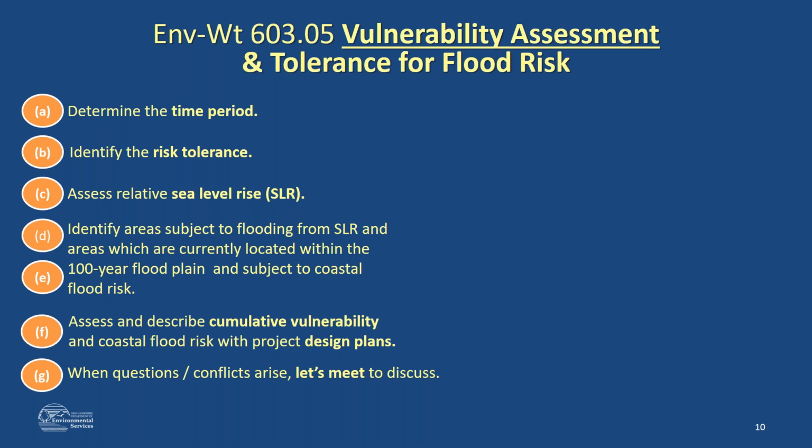So when you go through that stepwise process, you might realize that your asset would be inundated under the anticipated scenario. And if there's a conflict, then the rule requires a pre-application meeting. So we would meet with the applicant, your client maybe, and discuss what alternatives might exist for designing the least impacting alternative to the resource and accounting for the appropriate sea level rise projection.